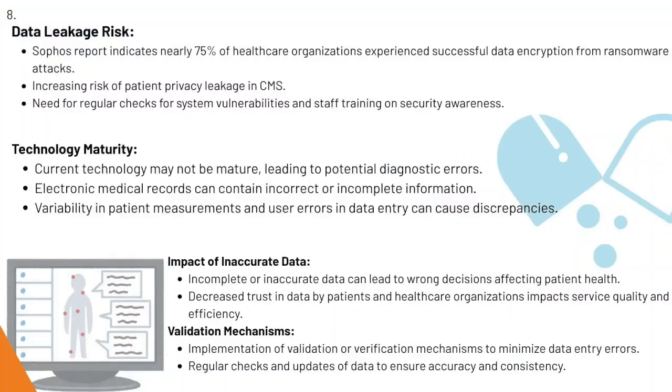The development of a clinical management system signifies a technological advancement in medicine, but it also introduces significant risks that require effective risk management. Data leakage risk. A report by Sophos reveals that nearly 75% of healthcare organizations faced ransomware attacks that successfully encrypted data, highlighting an increased risk of patient privacy breaches. Regular system vulnerability checks and staff training are essential, alongside public awareness to report issues properly.